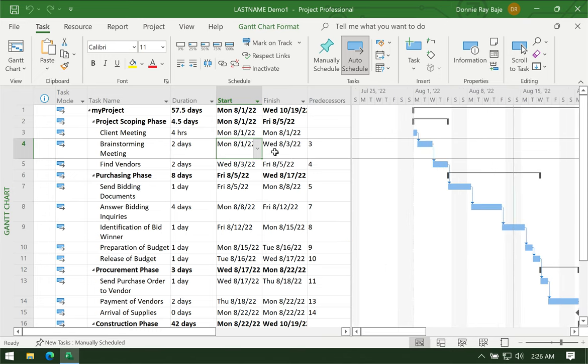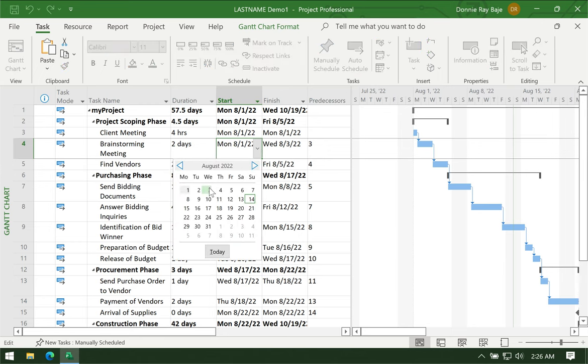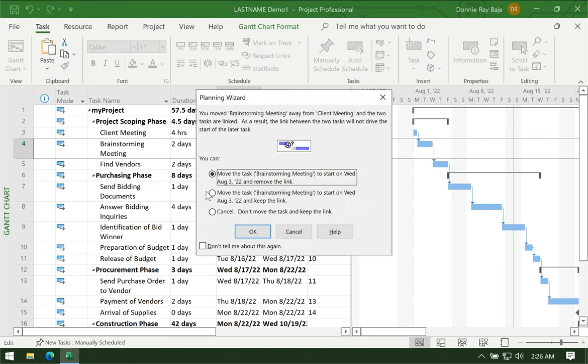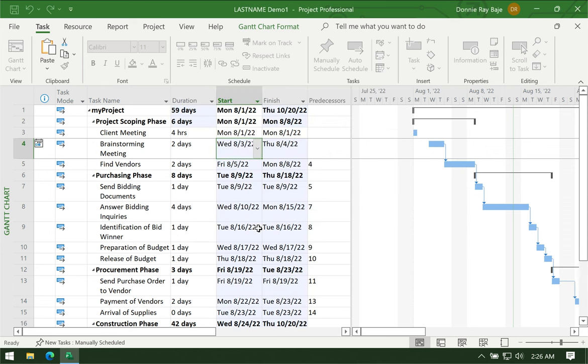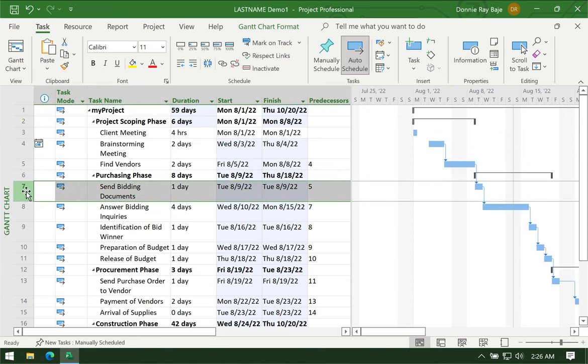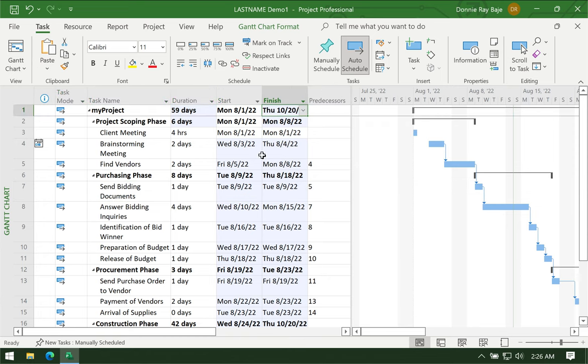The idea of MS Project is that when your tasks are linked, if you change any of the start dates, then the succeeding tasks will update accordingly. So you will easily see if a certain task will be delayed, or if there are changes in the date or in the end date of the project or a certain task. So let's start doing this.